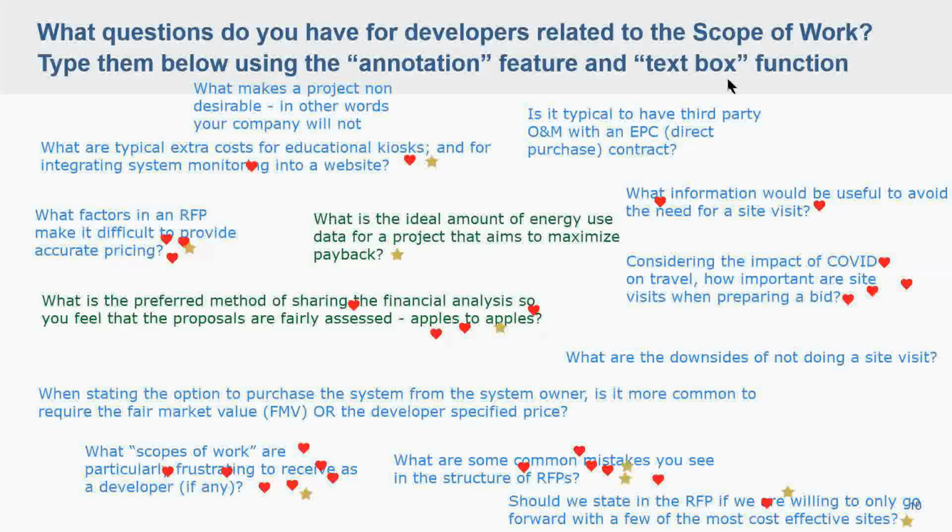Two things that I see a lot on levelization are specifically around system size. It's okay to have some variety in system size, but for example, if you're looking at saying, okay, this system is going to be load limited, and you're sizing it to 90% or 85% of your existing load, then we will actually lock the generation in the bid form.